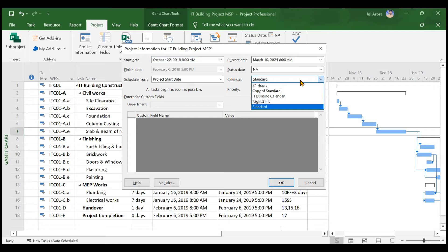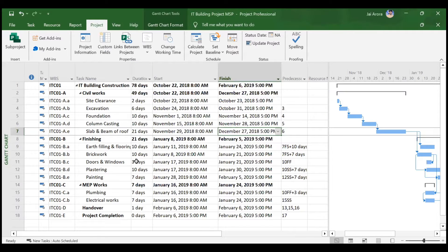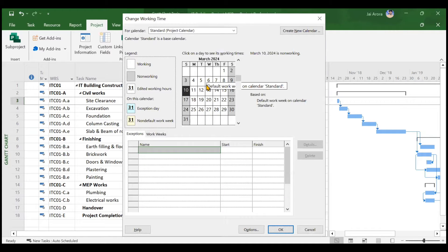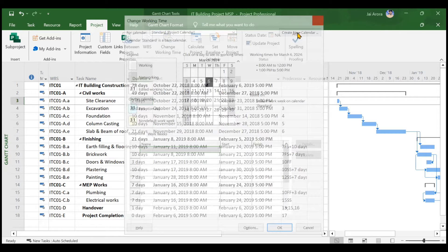Now we have to assign the IT Building Calendar to the project. If you change this calendar to IT Building Calendar, MS Project will change the duration of the activities. For example, site clearance has a duration of two days. Working hours based on the Standard Calendar is eight hours — from 8 a.m. to 5 p.m., minus one hour break, giving eight hours of work per day.